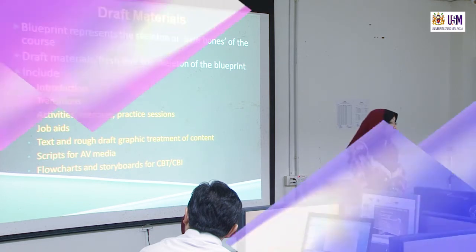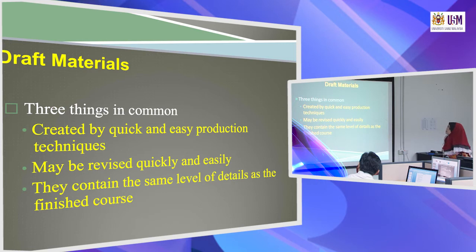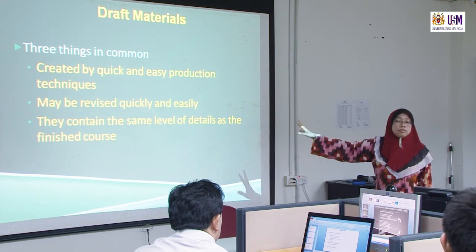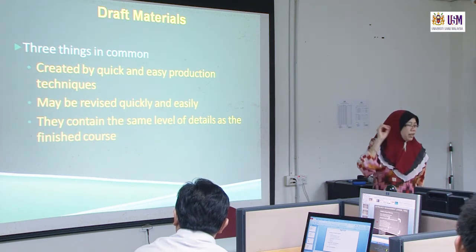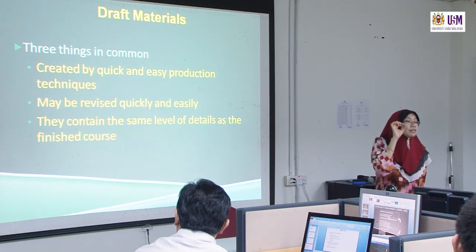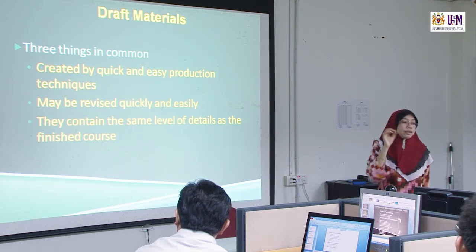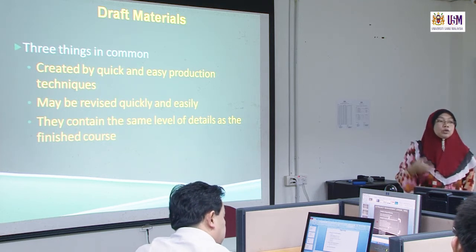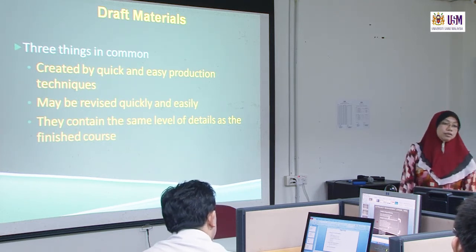Okay, this one needs to be confirmed. Three things in common: they are created by quick and easy production techniques, they may be revised quickly and easily, and they contain the same level of detail as the finished course. So by now, Roseline's program book should be almost ready. If you want to change, it will be a very, very small change. For example, maybe you need to change 10 minutes of the seminar, then that can be done, but not the overall. If you want to change the date, for example, that will be a very big problem.